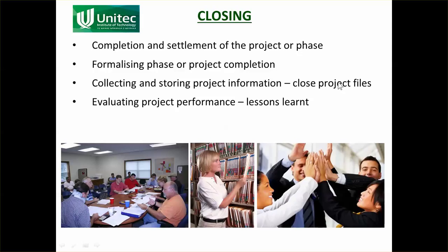You close down the project files, so you will have files recording all the inspections, all the communications and things like that. That's important information, so you don't just throw it in the bin, you store it. Because the next time you do a project like this, you want to be able to build on it, do it better. And you're also evaluating your performance. What went wrong, what worked and what didn't work. Learn lessons. So that's that ACT part of things.